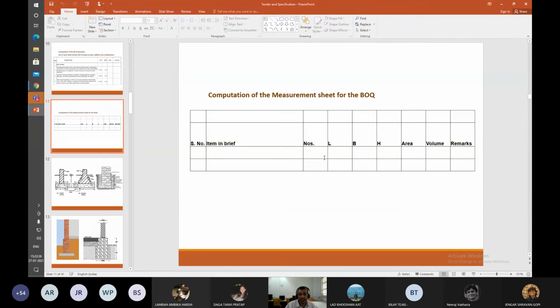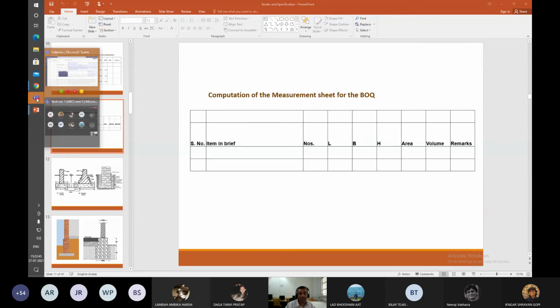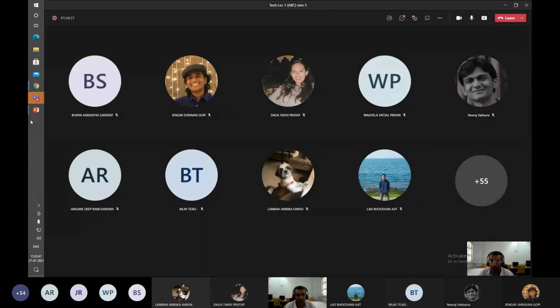The length and the breadth will give you the cross section of the column. The height of the column will give you the height of the stub column, and the concrete will be calculated in volume. The last of the lot is going to be the slab.